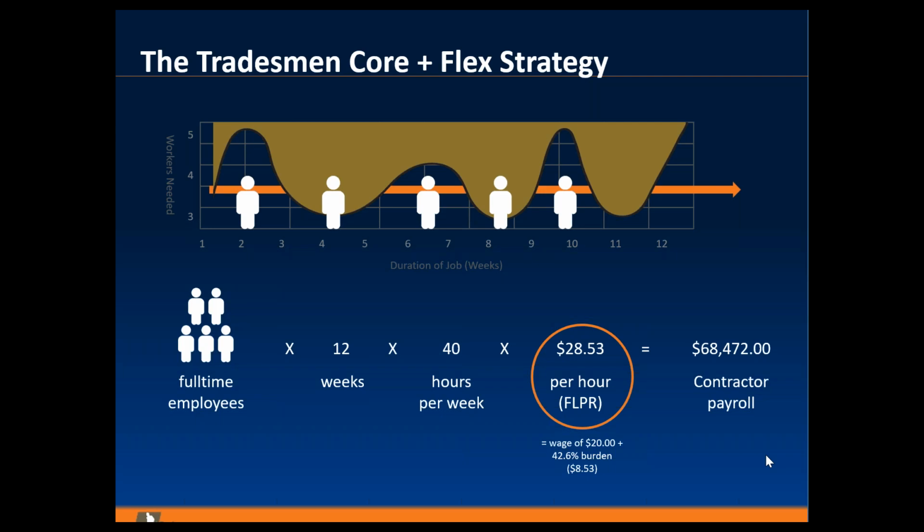So if you have a company where you're doing one project at a time and you have 5 employees, on day one, even though it may not make the most sense, you start that job with 5 employees. Even though if you look at the median on this project, the median on this job would probably be 3 employees. And again, those are the kinds of things in advance of the job that tradesmen would assist in identifying. Where is that time where we've got guys standing around, or we've got guys that are basically eroding profitability on the job in place. And our suggestion would be, as you can imagine, to remove those workers and only go with the amount of employees that you could keep productive on the job basically throughout.